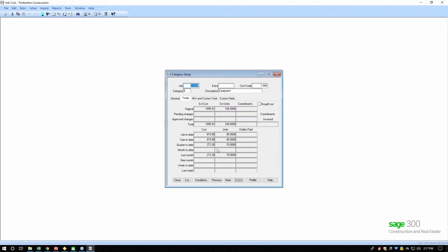Those are one set of tables, but there's another set of tables that are for commitments. When I create a contract, like a purchase order or subcontract, even if I use the purchasing module, it still feeds this. This is where I have my contracts between me and someone else, and I can then enter invoices against it. So transactions are created. Those invoices are updating these totals, but they're also updating this accumulated table.